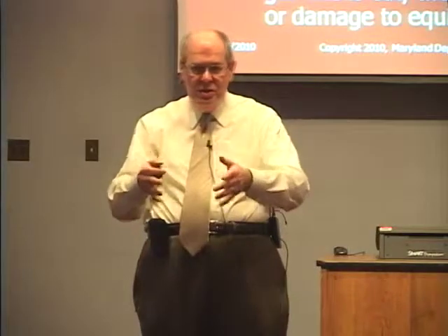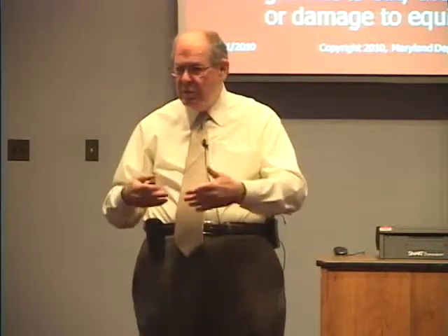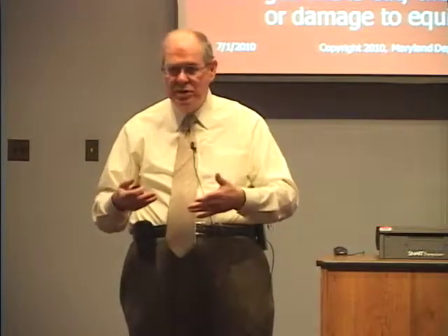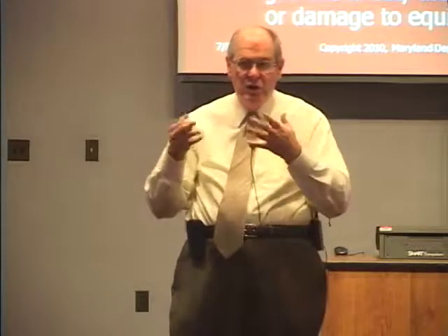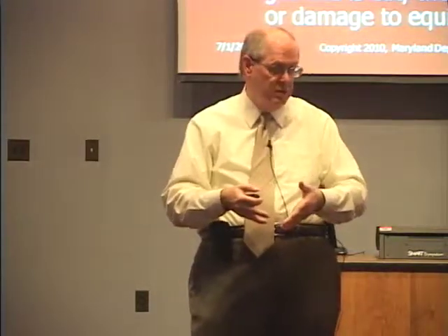Now, I've included in my price to dig here to this depth. Now, what do I start doing? Go 5 feet away, 10 feet away, 20 feet away? What do I do? Because the more time I'm on the job, with people out there, with equipment out there, I'm incurring more cost. And it isn't because I'm doing something different. It's because following the state's dictates, I'm not finding what the state told me was there.